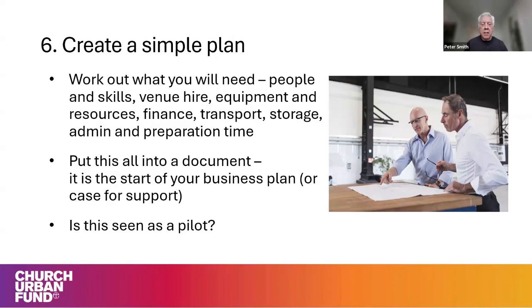Put this all into a document, I suggest. Call it a business plan if you're a business person, call it a case for support if you're a community person. It doesn't really matter. It's the same thing. Build up a case for why you're doing it, what you're going to be doing, and how you're going to do it. And my advice is probably call it a pilot. A pilot's great because a pilot means you can try it and see, and if it doesn't work, you can change it, and you can reinvent it. If you're saying, right, this is what we're doing for the next 10 years, you're putting yourselves in one position. Whereas a pilot is flexible. You can measure things after the pilot's finished. You can go, how did that go? What do we need to change for the next version? So continuing on.